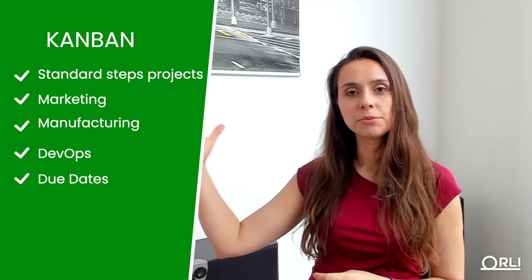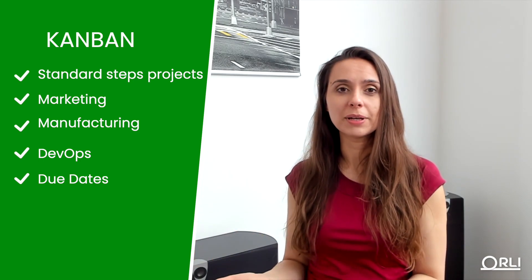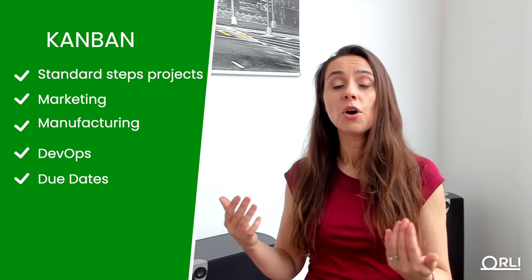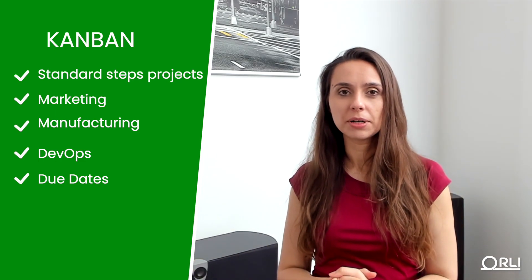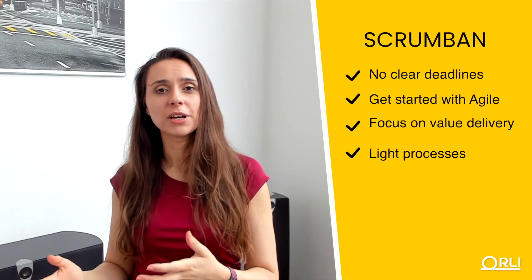Choose Kanban if your work is the same process over and over again — maintenance, marketing, manufacturing, deliveries — Kanban is the best fit. You take items one by one, deliver them by their due date, and present to stakeholders. For retrospectives, you can run them every Friday, every second Friday, or after every fifth or tenth ticket resolved — find your own balance.